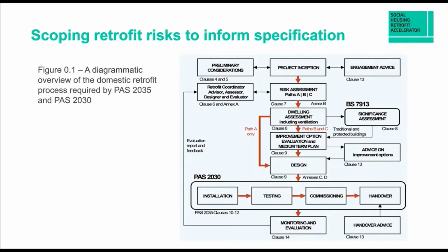So the idea of the risk pathway process within PAS is to really give an appropriate risk category to different projects, whereby, as I say, if you're dealing with one project, one measure, which isn't a high risk measure, then all the processes which fall out of that low risk category are relevant to that sort of project.